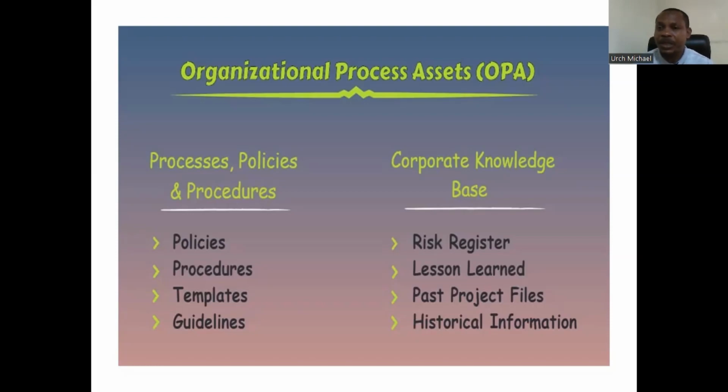So every project risk management process is documented for future use. You have to fall back to that and figure out how they manage risk in this organization. You look at it and say, okay, the first thing they did was itemize all the assumed risk in the project, and then they prioritized, and then they did their qualitative analysis, then their quantitative analysis, and then they were able to come up with their risk responses and all that. So all these items and processes are itemized in the risk register. You can see all that.